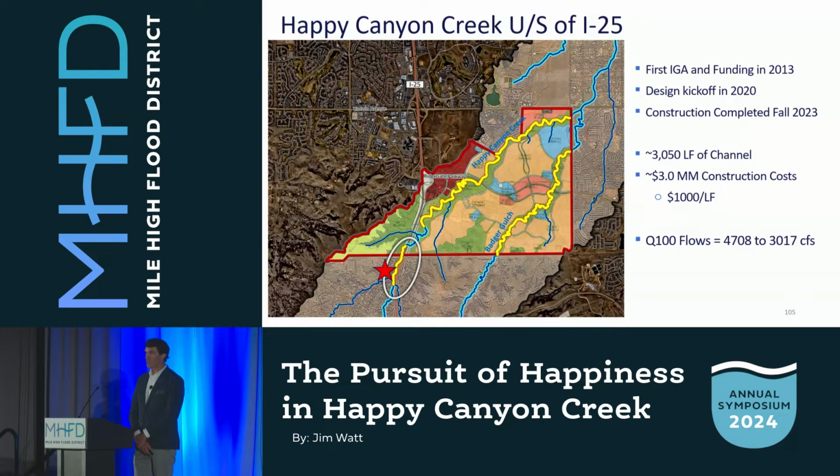The project improved just over 3,000 linear feet of channel at a construction cost of just slightly over $3 million. So that works out to be about $1,000 for every linear foot of channel that we improved. A few years ago, that would have been a really expensive project, but sadly these days it represents a rather cost-effective project.